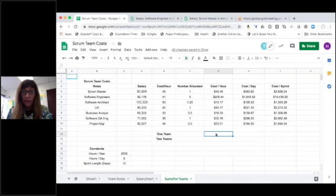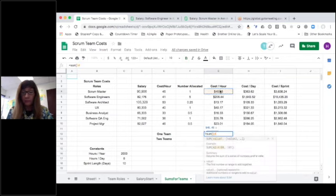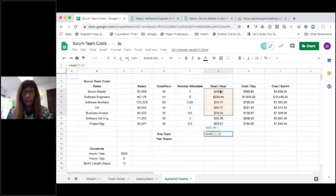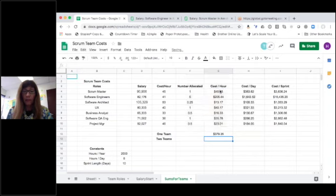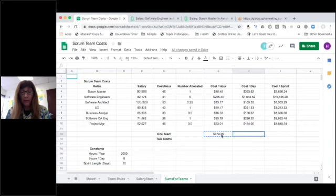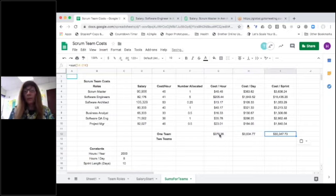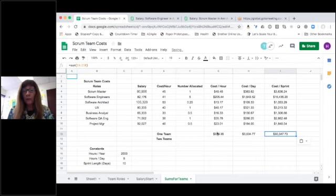I've summed that total and I want to do the same thing here. What is my cost per sprint? So my cost per hour for the team is $379 for one scrum team.